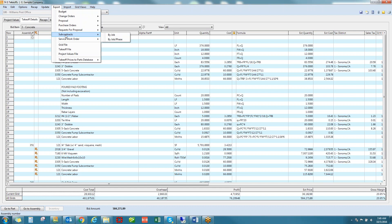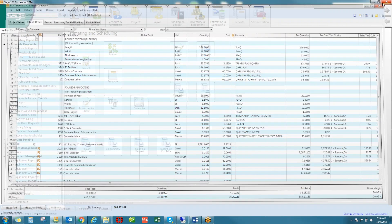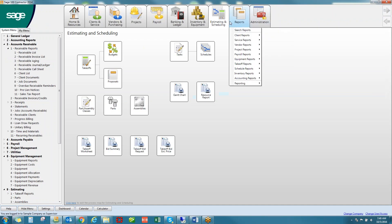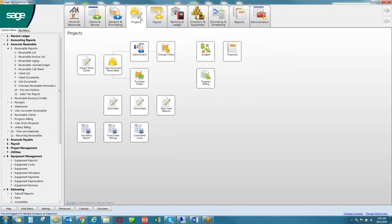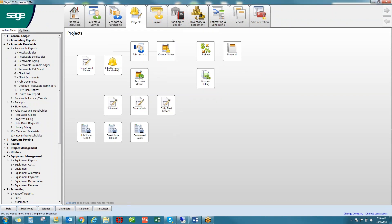Users can return to the estimating tool during the project and use the features to create detailed change orders and service work orders. Once this information is exported, it becomes a part of project management and accounting. You can manage committed costs like subcontracts, change orders, and purchase orders.